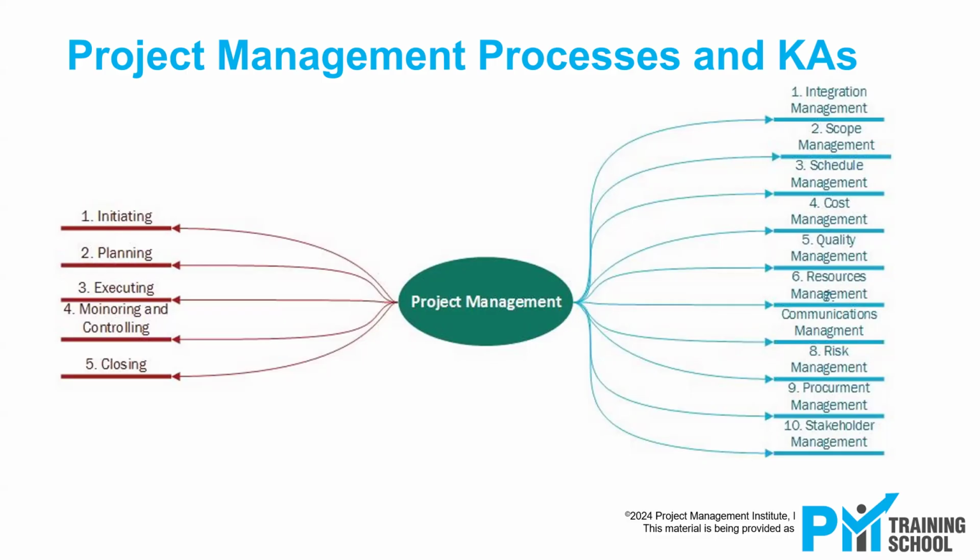It's essentially when you first start a project, you start to draft up a high level timeline as to when the project starts and when it is desired to end, and then you try to break it down into stages, and you see if it will fit or not at a high level. And then you get to the next level of details, where you get the requirements and understand whether you need to extend the timeline or not. Does it look something like a schedule? Yeah. Okay, that is exactly what I wanted to clarify.